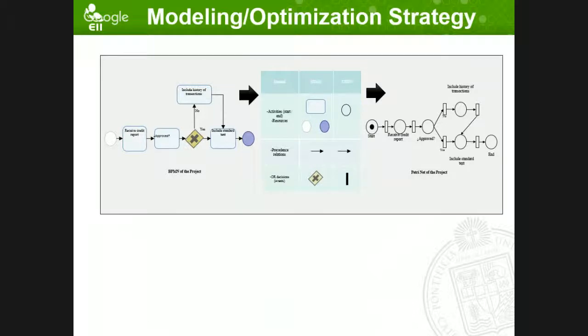So basically, this is what we do. We have the BPMN process editor, and we can do the mapping. We do the mapping one by one. So basically, this translates into this. And there is another advantage: we can use hierarchical modeling. Petri Nets are also compatible with hierarchies. So say at the top level for general managers, we have 3 activities: prep, production, and post-production. But once you go down the structure, you can go to the very details of rendering and rigging, all these activities typical of this industry.